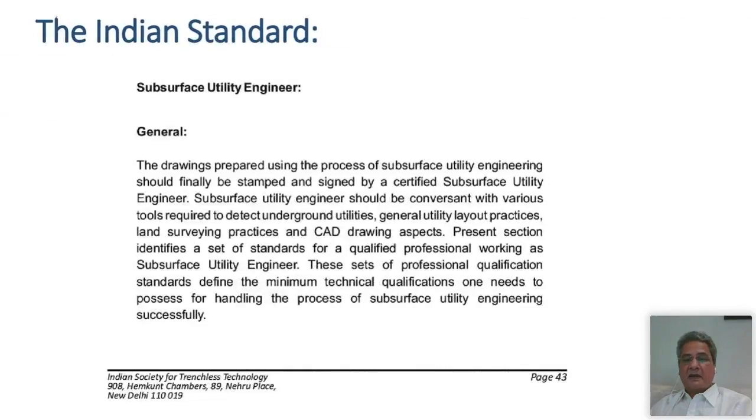So the Indian standard very clearly defines this also. What is a subsurface utility engineer? The drawing prepared using the process of SUE should finally be stamped and signed by a certified SUE engineer, who should be conversant with various tools required, CAD drawing, etc. So this is something which is now in the Indian standard.